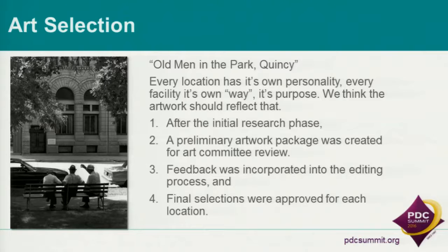There was one piece shown earlier in a waiting room space where there were a lot of switches. We didn't realize where and how that was going to occur. So we made accommodations, and the proportion of the art may have changed just a little, but there wasn't any other place to go with the switches with all the glass and other things going on, so sometimes you have to make accommodation as well. One thing we tried to do at the beginning of this was to reserve some of the construction budget for the patient room art, so some money could be held there in addition to the FF&E items, sort of below the construction cost. I think that helped some.